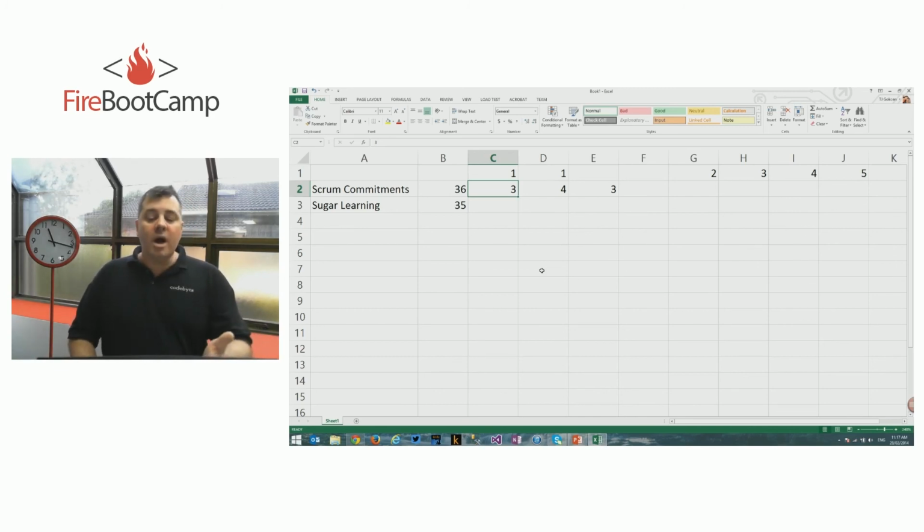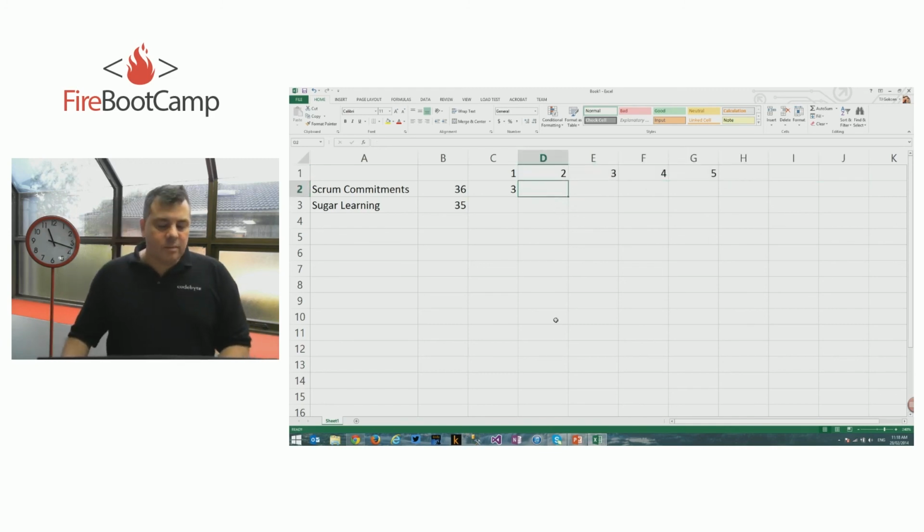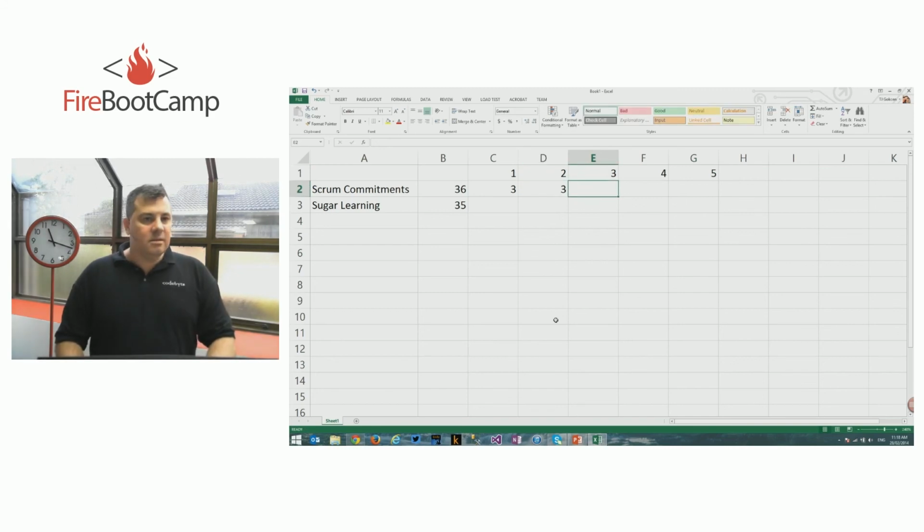And let's say you have 36 in 9 weeks, so you probably need to complete, on average, almost 5 PBIs every week, if I just divide it. Since we don't know how much we committed to, I do encourage you to take a look at it because it will give you a good idea, and I will demonstrate what I mean later. So how many did you complete in the second one? 3.